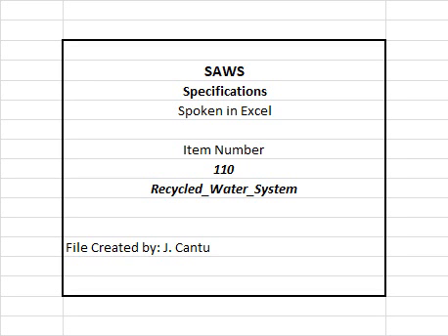110.6 Testing. See SAWS specification item number 841 Water Hydrostatic Testing. 110.7 Measurements. All work shall be measured in accordance with applicable specifications. 110.8 Payment. All work shall be paid in accordance with applicable SAWS construction specifications. 1. Materials paid on site will be in accordance with Table 1 of specification item number 100 Mobilization. End of 100 Series.